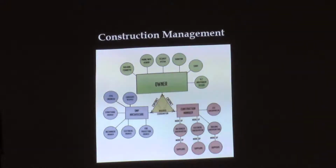Shoot. I'm looking at the wetlands plan and I see a 2006 certified sketch showing the library location, the pond, the limits of the wetland. This new one is a topographic worksheet where they've taken the 2006 one and blown it up and put it on top. I don't see any certifications that either one, other than the first one, is accurate. So I think it is possible that you might run into problems out there, because all they've done is blown up the first one on a different base map.